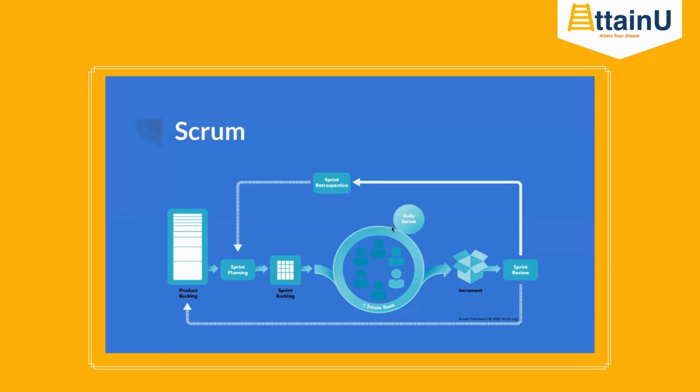Here, daily scrum happens. In daily scrum, it is just a small 15 minute meeting where you sit together and tell how the progress is. Are you stuck somewhere? Do you need help? Or something is a blocker and you will not be able to deliver this in time. How can we deprioritize or prioritize this, and things like those? What are the changes required?